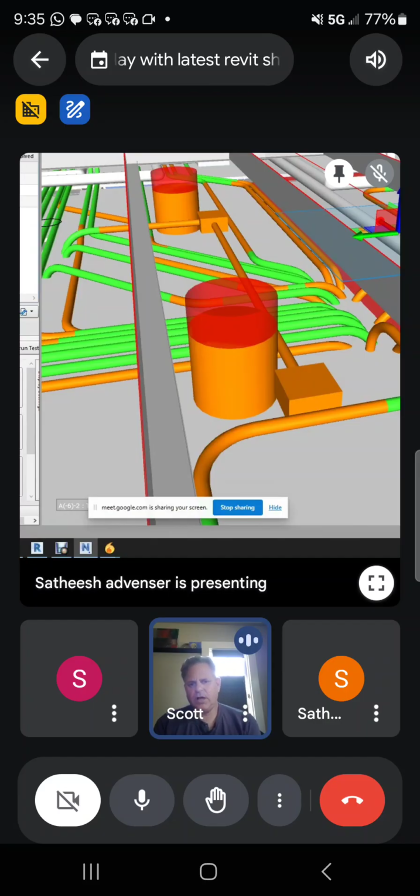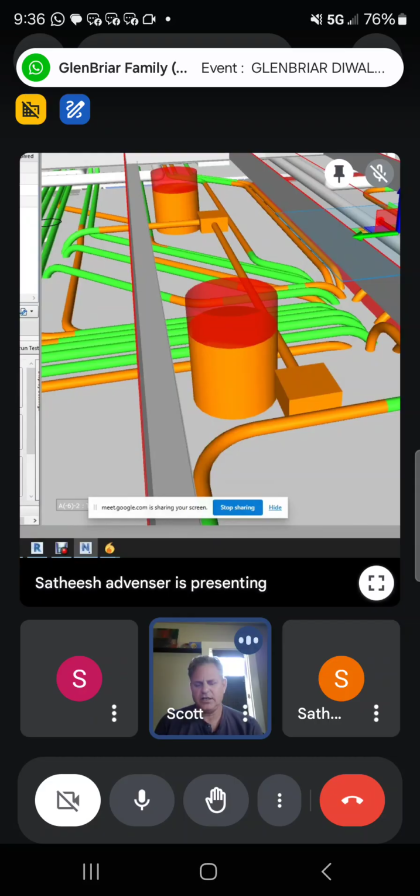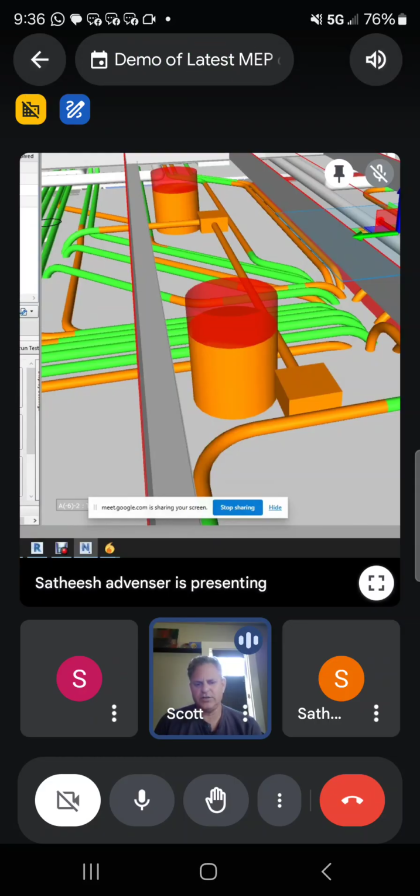Yep. I think we have a lot of work to do. If we start to isolate, for one, the plumbing is just incredible, but he's going to use generic toilets and a cabinet. We really need to pick all the brand names that we're going to use and supply him with the models and the elevations, and he'll pull that from the architectural drawings, just so when he's doing his work, it's all perfect.